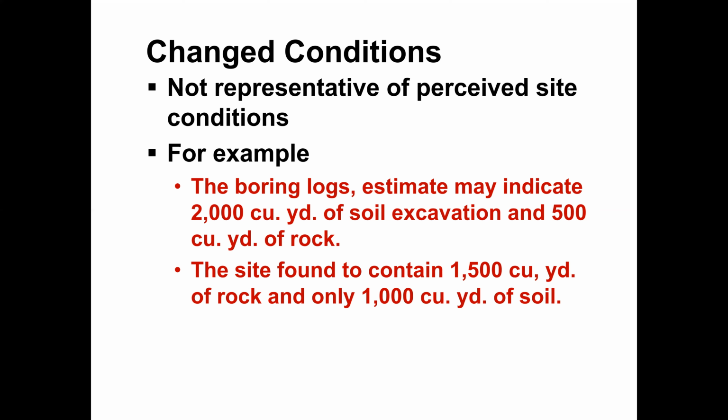Okay. So this is a changed condition, not representative of perceived site conditions. If this happens, then there will be a change order, or a variation order.